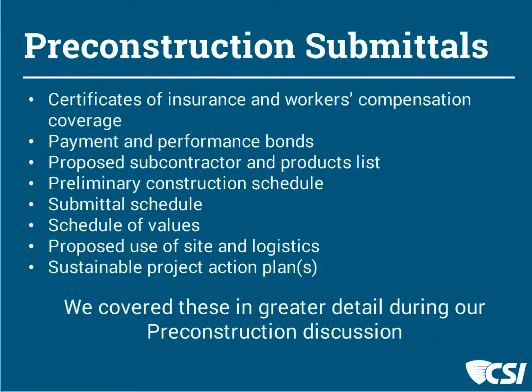These can be certificates of insurance specific to the project, depending on the delivery type. They may be payment and performance bonds. They could be subcontractor lists or product lists where your specifications may have required those be submitted as a proposed project team. They can be preliminary, such as a construction schedule as a rough layout. Some projects require submittals of the construction schedule and perhaps a schedule of values for the job early in the process before any pay applications are processed.